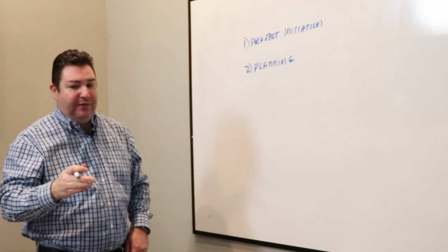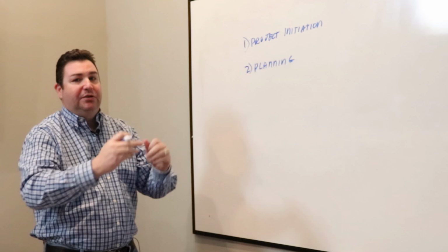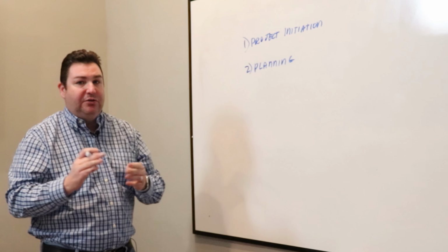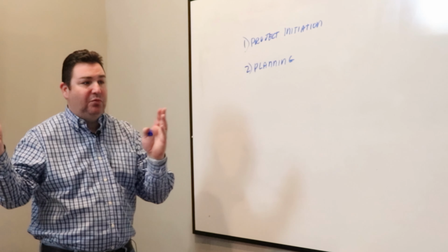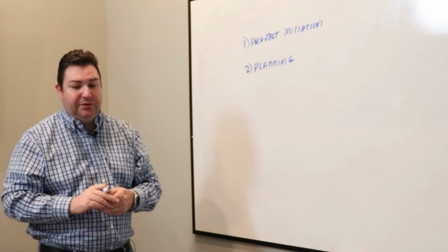So in that phase, you're going to do things like refine the scope that you defined under the original project initiation, because you're learning more as you go, right? You're going to go through your team selection. So you're going to actually replace a role that may say, project team member with somebody's name, right? And say, now we've got to the point where we understand who's going to be involved. We're defining our resource requirements. So who's involved and for how long, right? And maybe that's hours, maybe that's weeks. Depends on what the overall goals and objectives are.